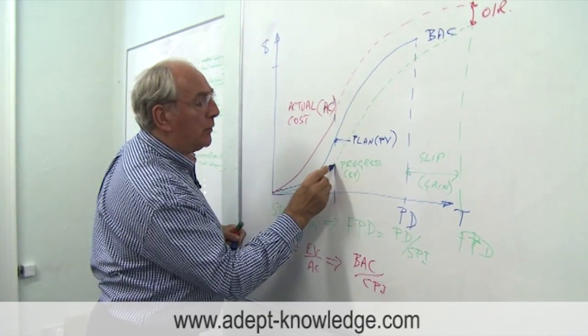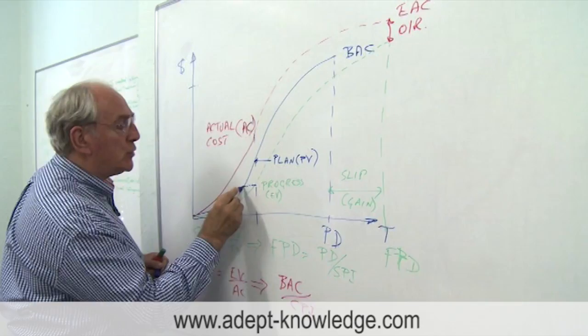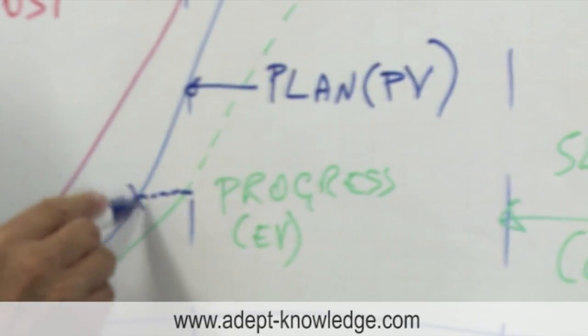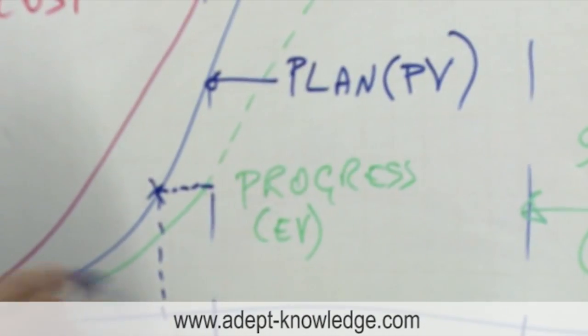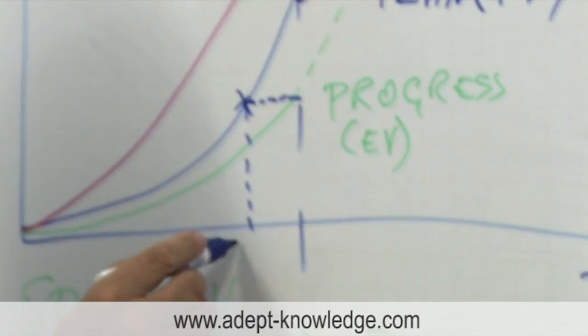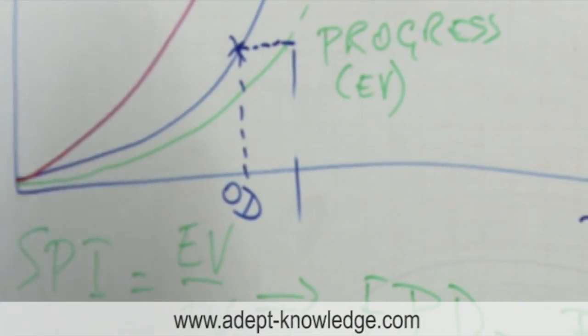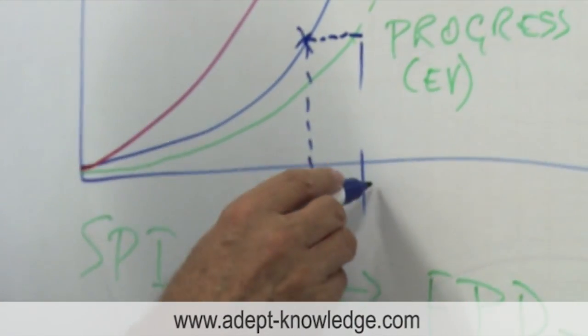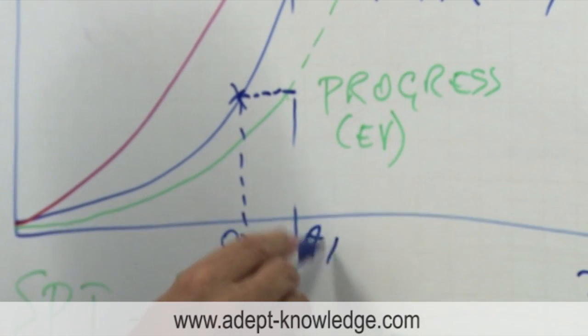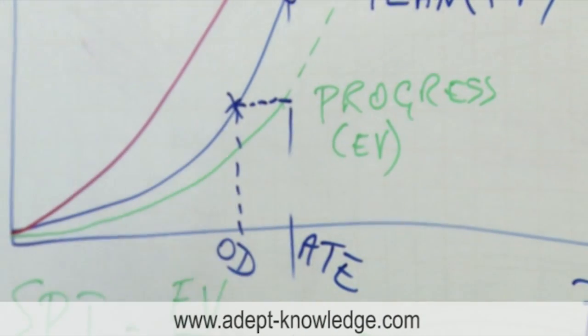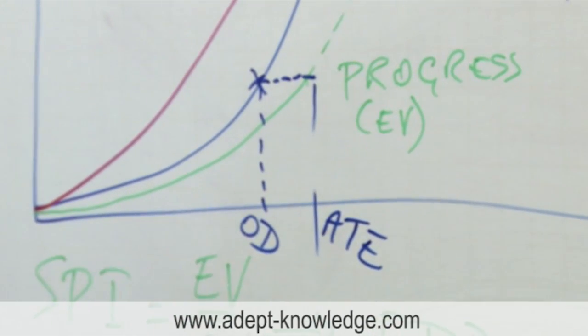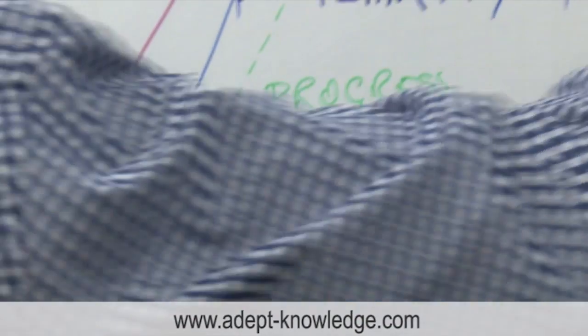We drop that down onto the timeline. It's called OD, the original duration, and our time is known as the actual time expended, ATE. So we have a really good measure now of a new kind of schedule performance index.